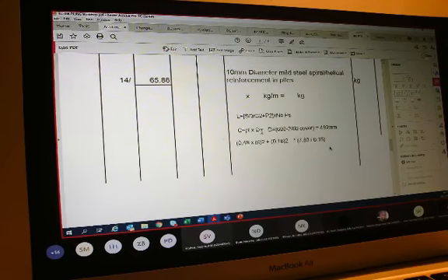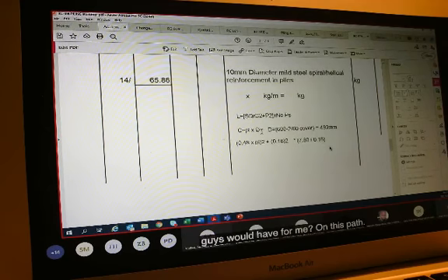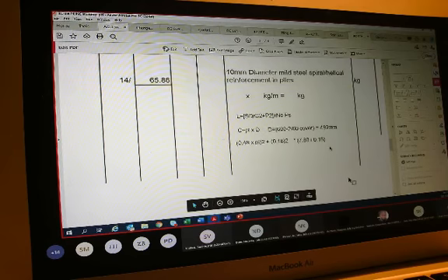And then whatever the type of formwork is, in this instance we say smooth formwork to sides of pile caps, projecting above the ground level, not exceeding 300 millimeters high. When it does not exceed 300 millimeters high, we generally measure in meters as per the standard system. And in this it will be 1.2 by 4 by 14. And that, ladies and gentlemen, brings us to the end of that drawing RC008, which is the pile with a pile cap.